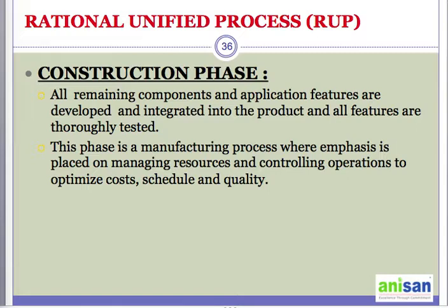So this is what we are talking about: moving from building the solution to the operations stage. And the last point RUP mentions is whether the actual resource expenditure versus planned expenditure is acceptable. This is another stage where you can check whether the expenditure is acceptable. It is very late, because we have already spent and reached a stage where there is no going back, we have to move forward, we cannot stop or cancel. The only thing we can do is based on the budget.